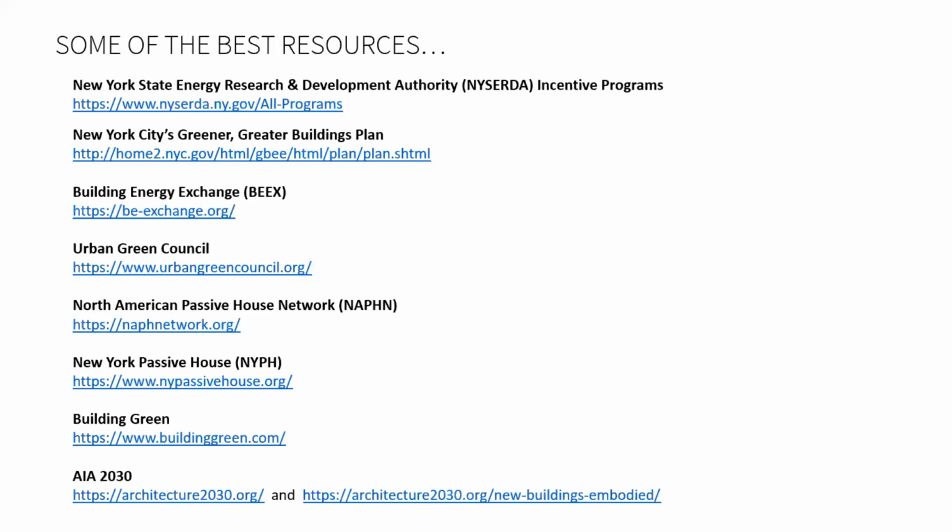Right. There was also a question about the cost per square foot. I don't have cost per square foot for all of these projects, but I know for at least the ones I presented, they range from around $250 a square foot to $350 a square foot. Some of our senior buildings, because of the way our funding works with the affordable programs, have PLA or union labor, and those are looking at more around $450 a square foot. It also depends on, for most of us, the structure and the foundations can be a big cost differential for these particular types of projects.